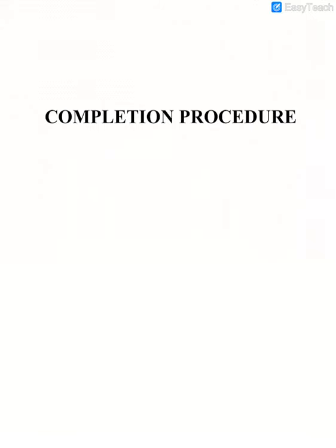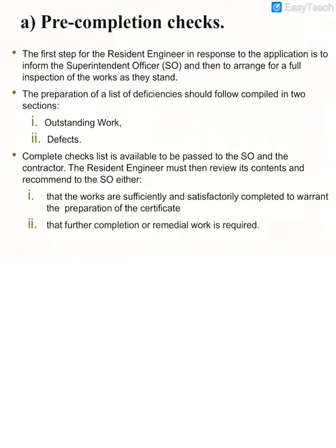Okay, now I will explain the completion procedure, meaning the actions that need to be taken after the completion of the project. First things first, when the project is completed, the contractor will request the certificate of practical completion.